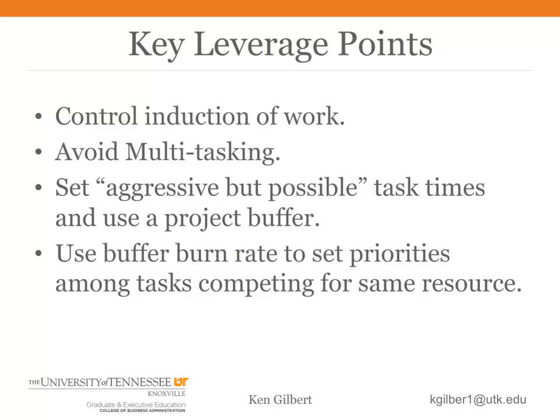Here are the 4 key points that you should learn from this video. Since projects take so long, we induct them as early as possible. We also do that to keep people busy. In other words, we start the project as soon as the person who does the first task in that project becomes available. CCPM says do not do that.